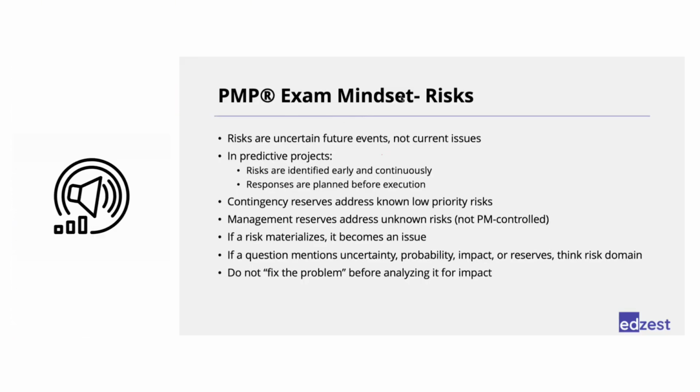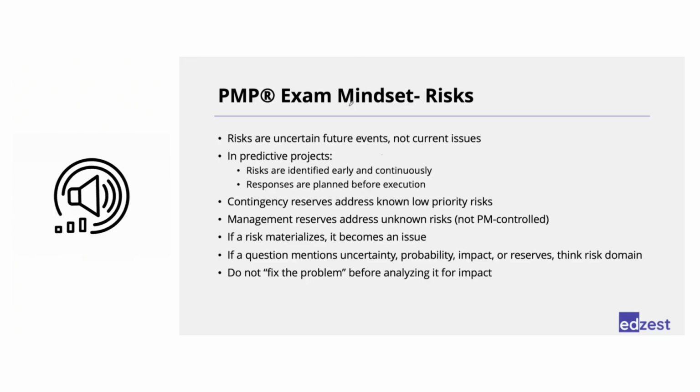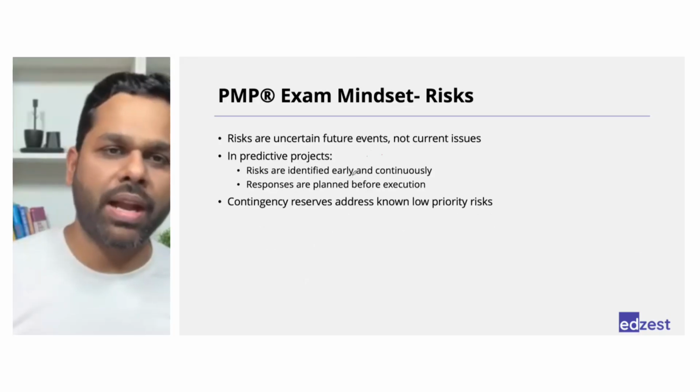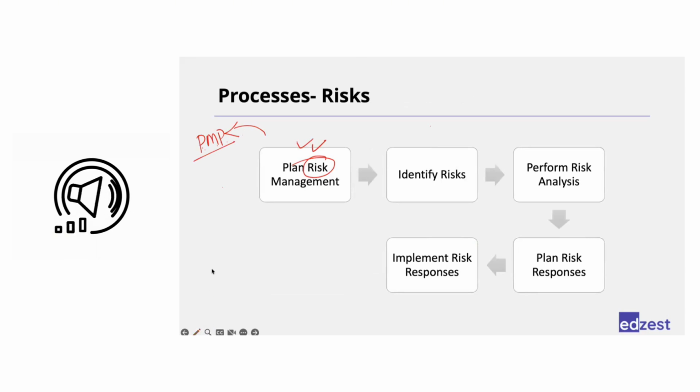Should I go for one more question? Yeah, please go ahead. So one thing I want to ask: do we start analyzing risk at the start of the project, or how does the process flow? As soon as you have identified the risk, start analyzing. Okay. And if it impacts the scope or schedule or anything, then we have to go through change management control.